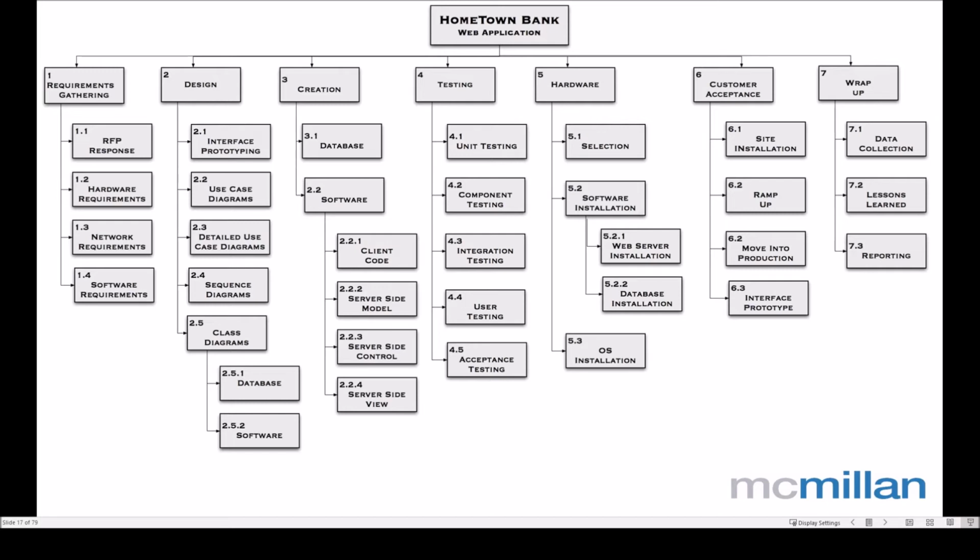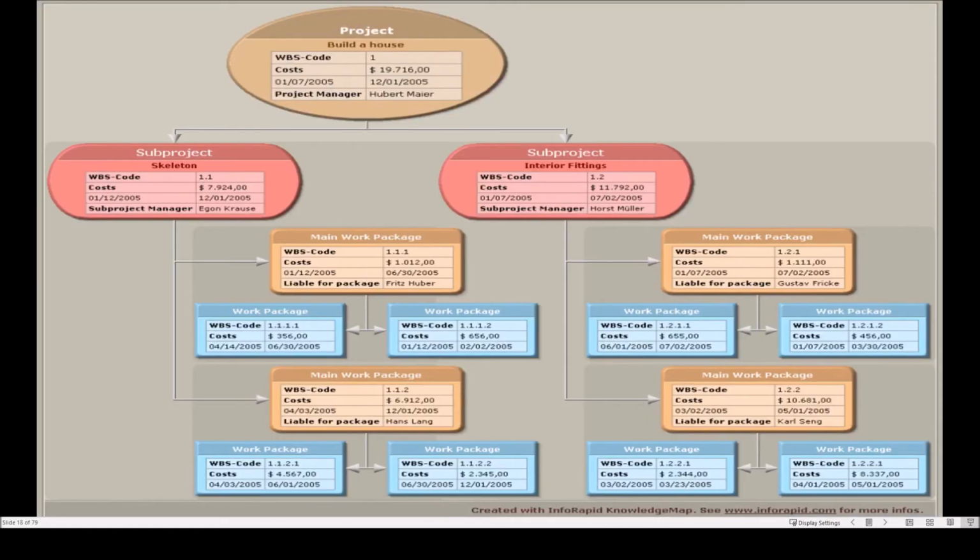We may even consult some of our suppliers who may have quite a deep understanding of what we're trying to do with the project and be able to share some of the experience with us. So we undertake this decomposition. Once the deliverables and the tasks are unpacked, such as this, we then start from the bottom and we start to build up the time required to do it. So, and I'll go to the next slide to demonstrate this.